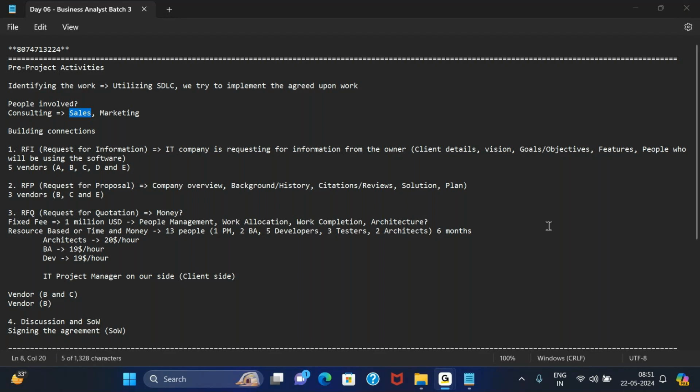Okay, that's why the project manager is there. I'll talk to the team. They say that earlier we gave an estimate of 100 hours, now maybe it will take 150 hours to do the work. Now it is the project manager's or scrum master's duty or responsibility to ensure they get the work done, either by hiring more people or by asking the existing team to stretch beyond 8 hours, because the client is not ready.